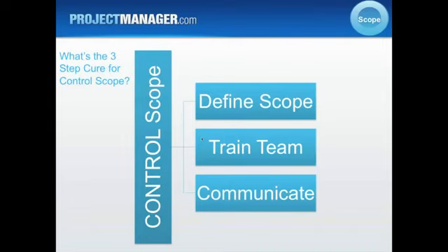But that's different than the project scope. The project scope identifies all the work that needs to be done to accomplish delivering the product, service, or result of the project. So the project scope is more like the activities, the tasks that need to be done to begin producing the deliverables. So that's a great question. There are two different things, and they have to be identified. Again, both principles apply where it's good to identify what's in scope and what's out of scope for both of those.